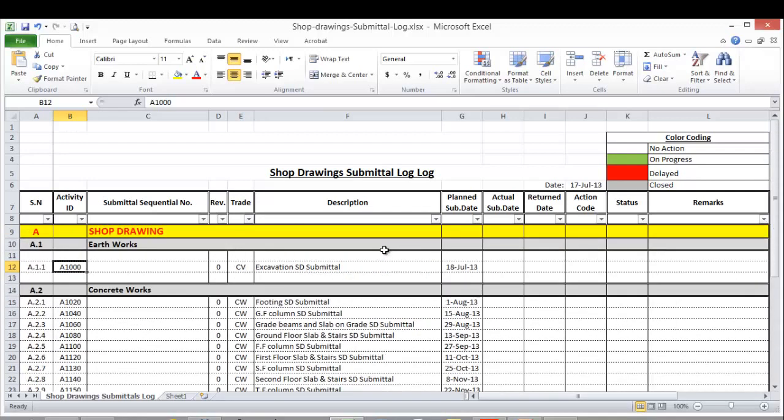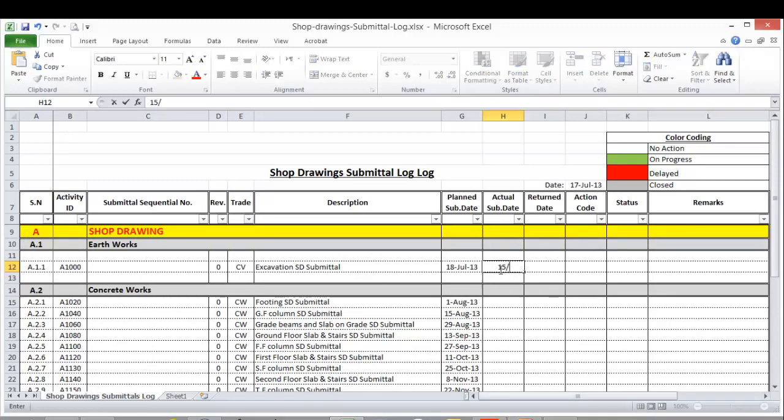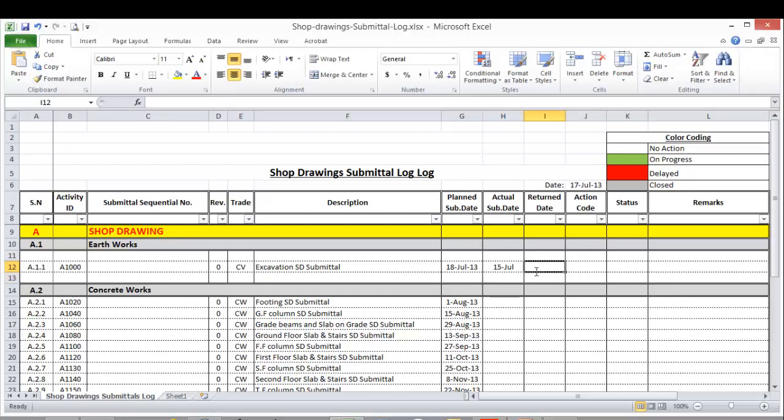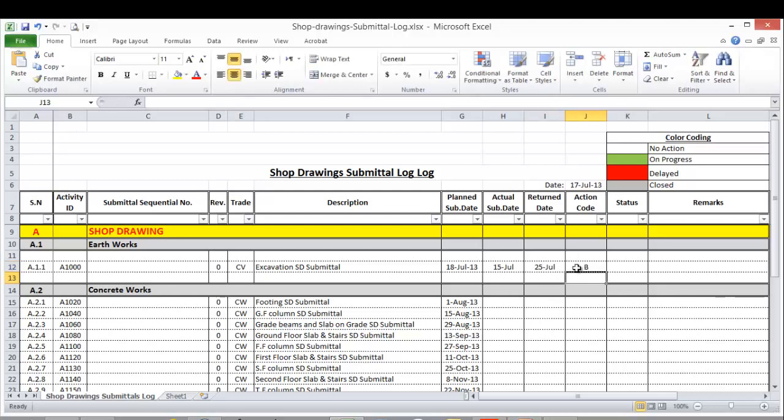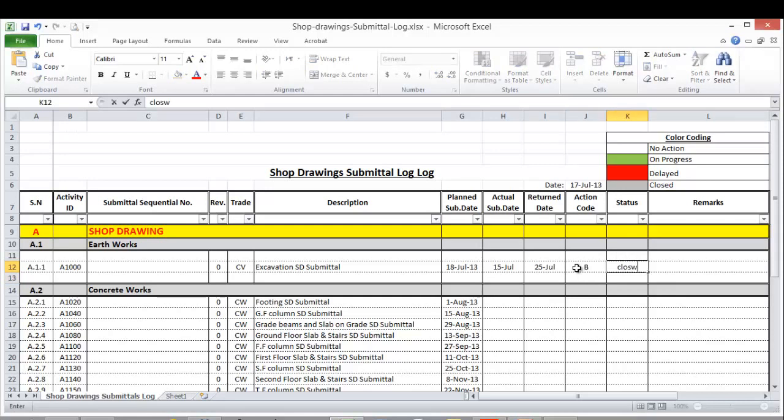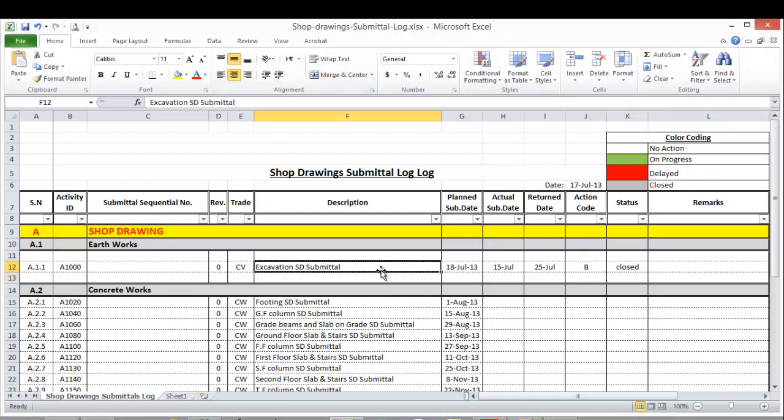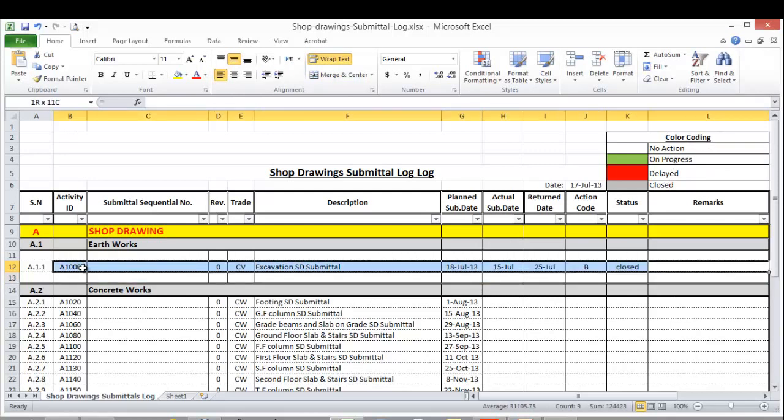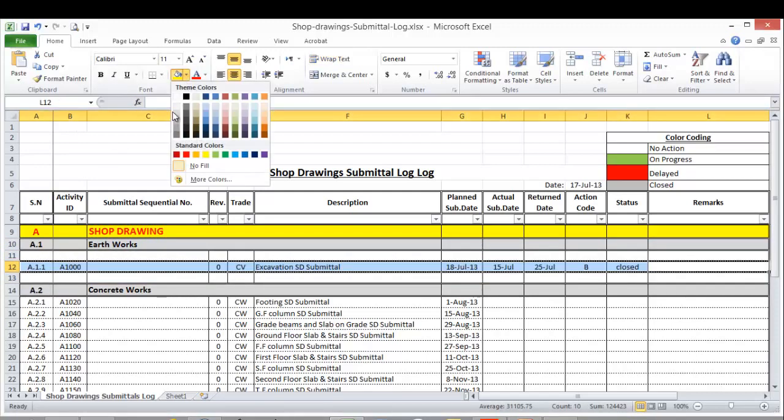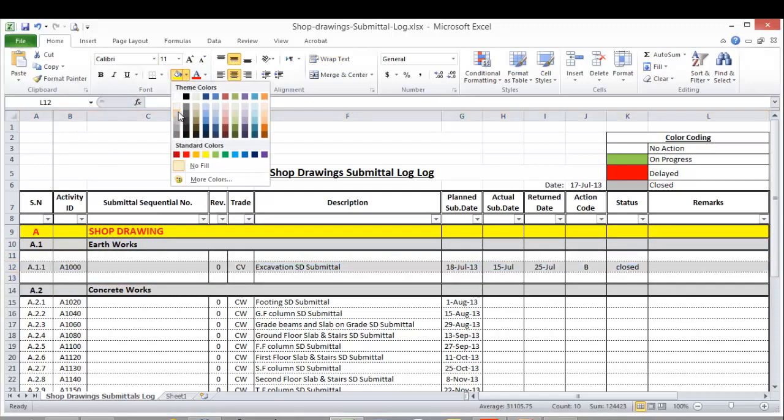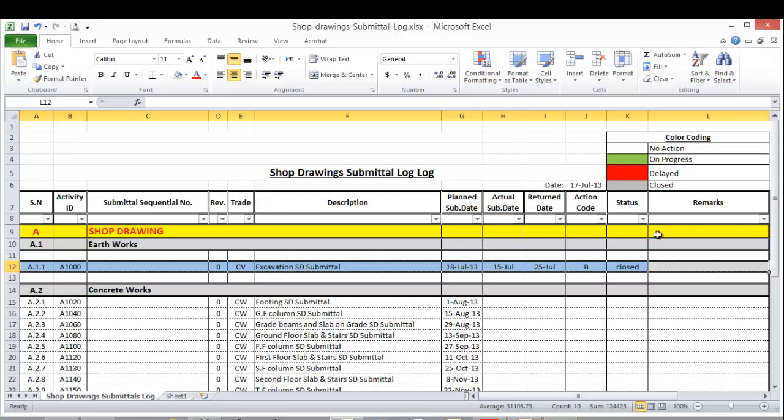Now let's say that I submitted this drawing on 15 July and the return date is 25 July. The action code could be B - it means approved. The status is closed. Now here I have the color coding. When it was white it means no action. Now it is closed so I should fill it with gray color. This means closed.